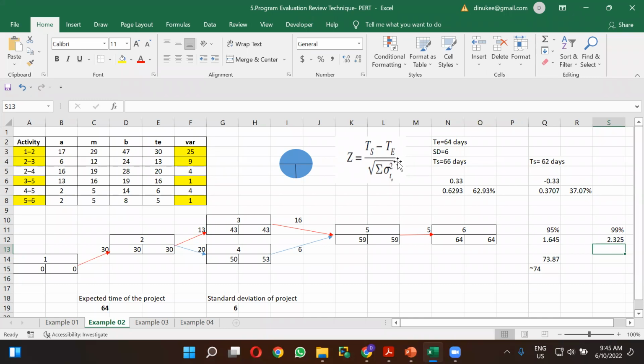As it is minus here, when we are going for the other side, you have to add this back. So it is 64. So the answer is 77.95 days. So after finding this, for the 2 decimal place, you have to tell that approximately it is 78 days.